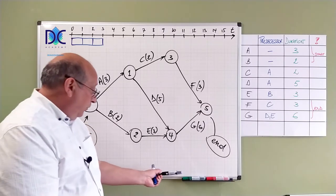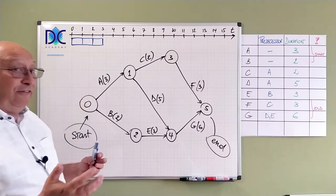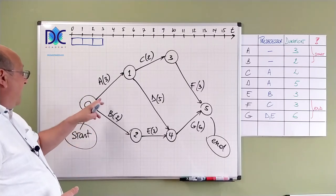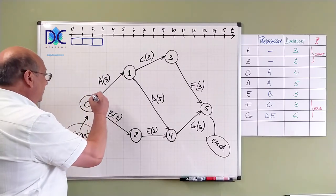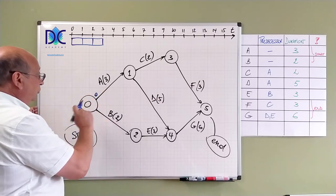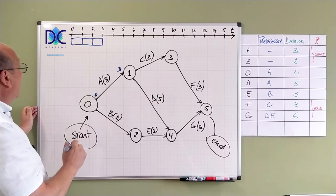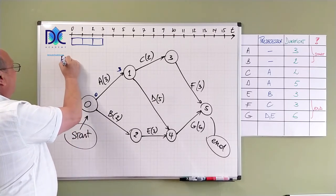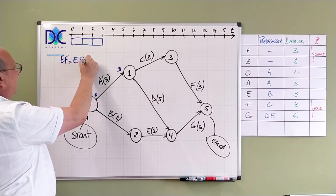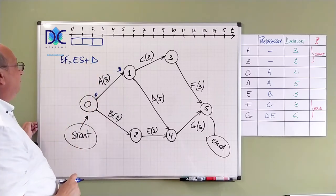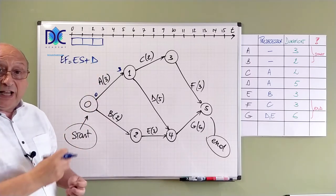Now the calculations. Well when we look at the calculations we have to see what's happening. A starts at zero. So we already know that. So the note here starts at zero. And finishes at three. So what we have is the early finish is early start plus the duration. Which is very easy to calculate.